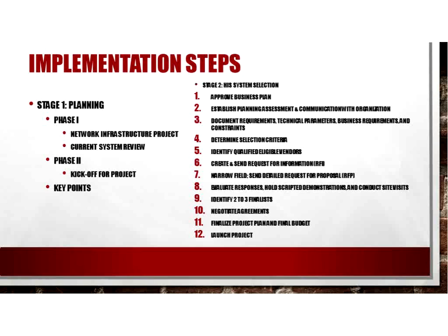Your new system should be implemented in a basic way first, and then you add advanced functionality after everyone has some experience with the basics. Take the opportunity to standardize the computing and data environment. This way you can find those gaps, and those gaps are going to represent opportunities to fine-tune your operational environment.